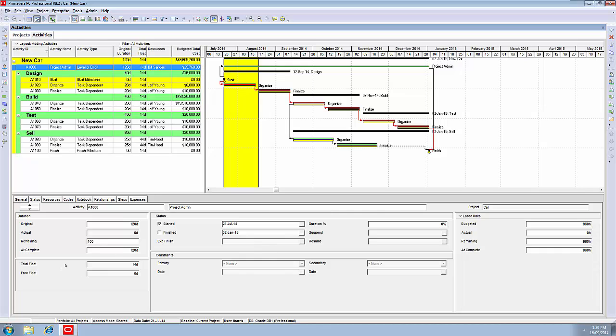Whenever we're doing an update, there are three things we need to update on every activity. The first one is the dates, the start date, finish date, or remaining duration. The second thing we need to update are the resource hours involved. The third thing we need to update are expenses, if any expenses were involved in that activity. We've done the dates.